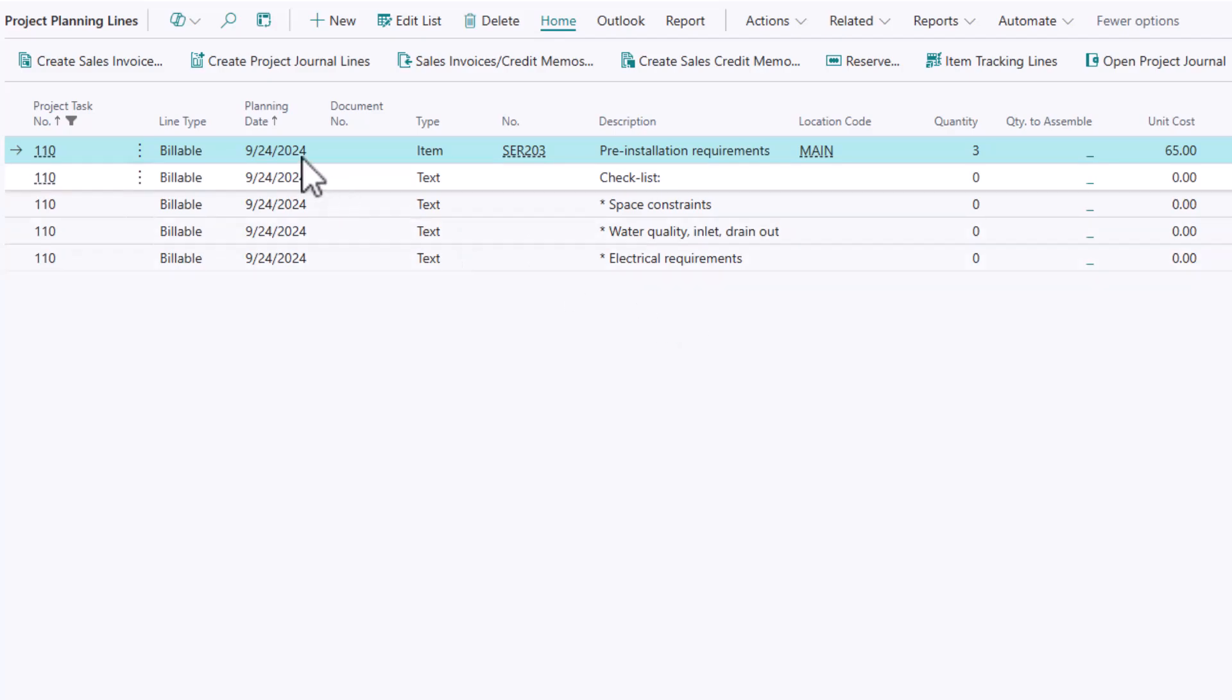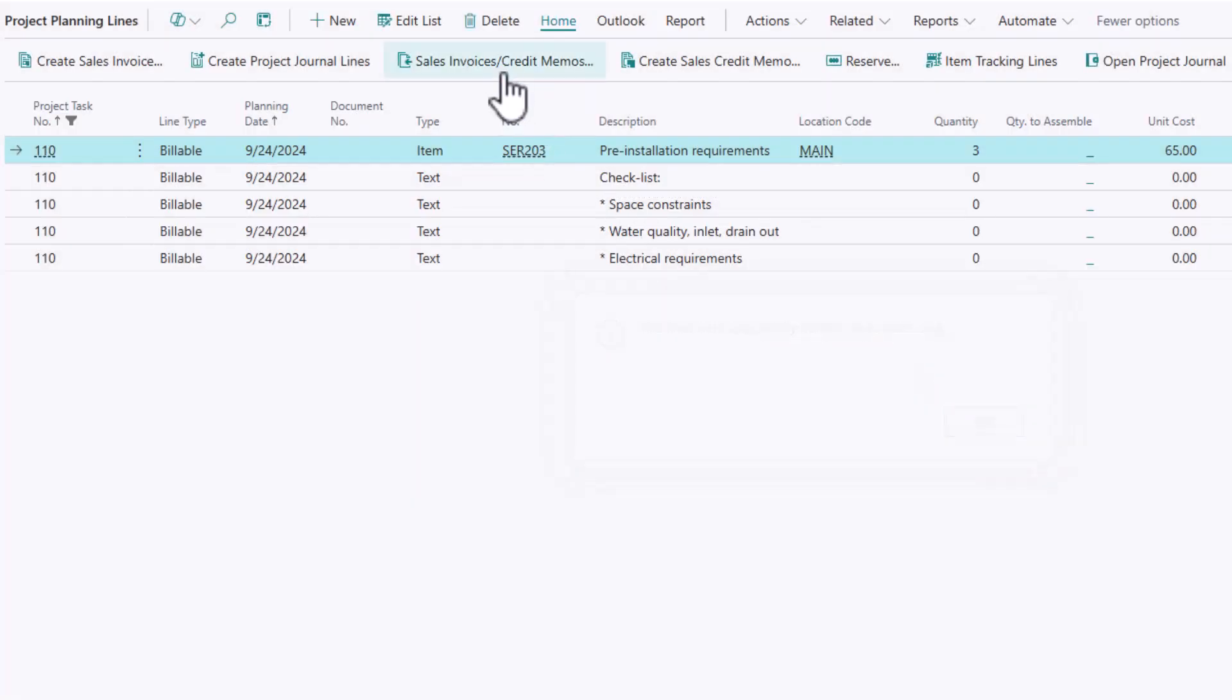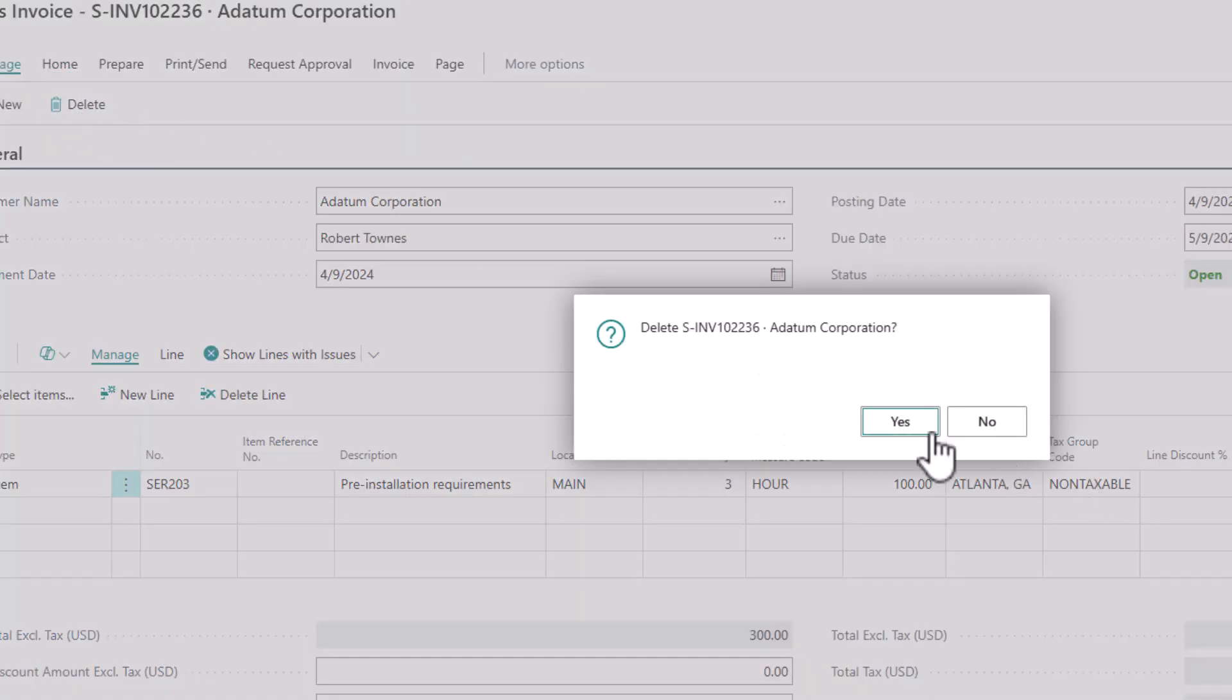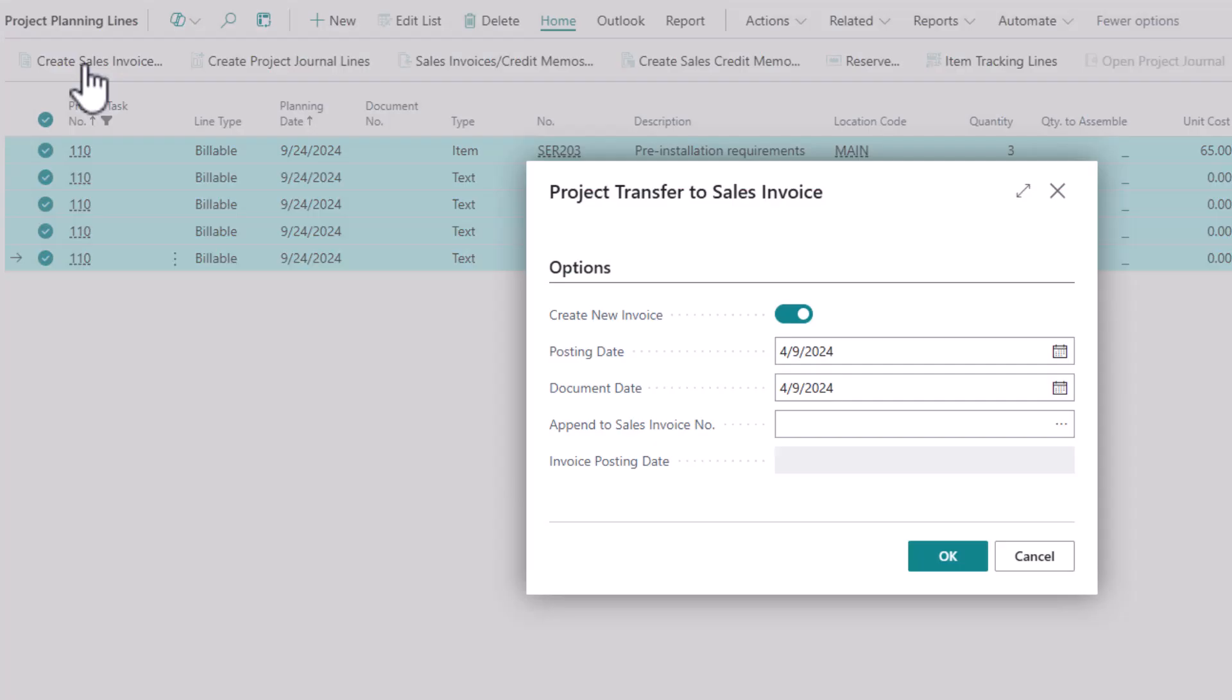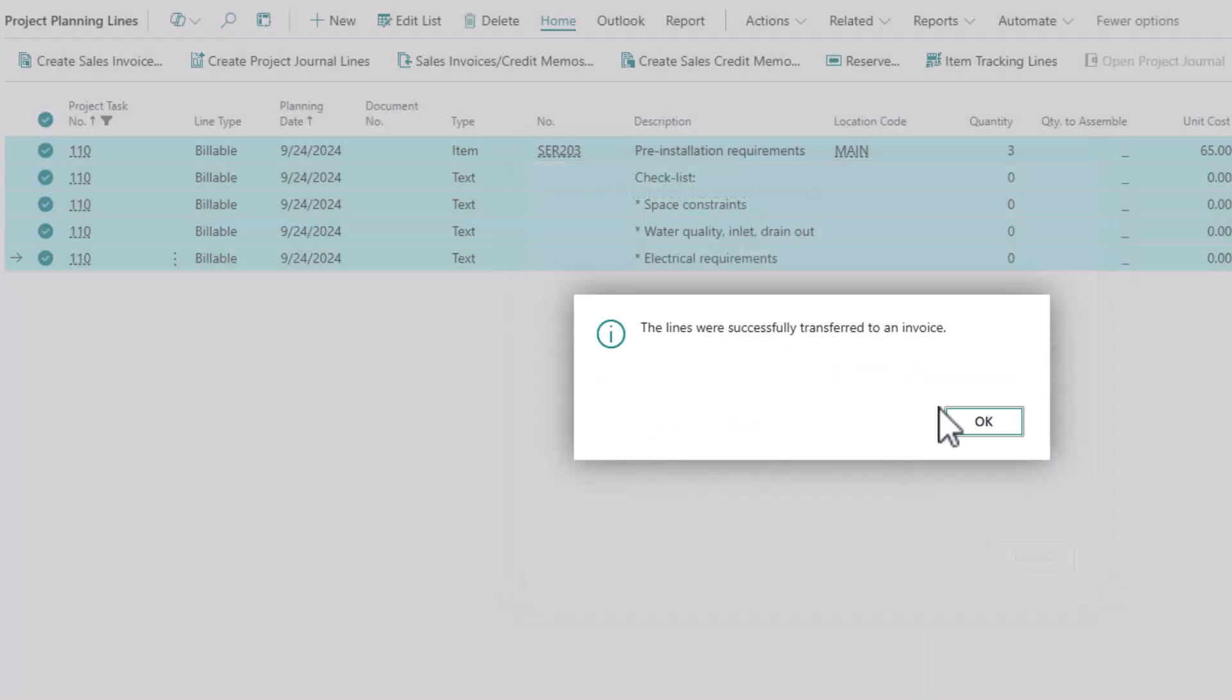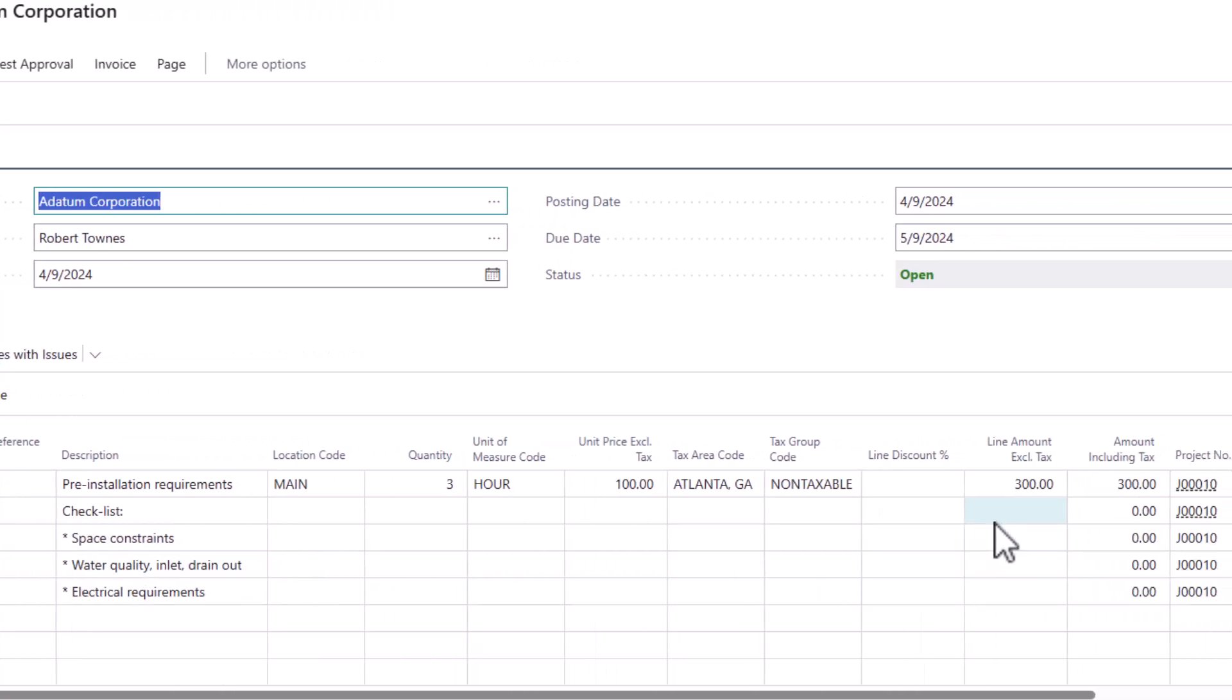Now you do need to be careful here. So if I run the process, it is only running it for the one line that I have highlighted. So if I hit okay, my sales invoice is going to come back with that single line on the invoice. So when you're running the process, you want to make sure you do a shift click or you use the little toggle to select more. Once you've highlighted all of your billable lines and you create the sales invoice, then it transfers all of those lines to the sales invoice. So now you'll see both the billable event plus the comment lines that went along with it. Now they don't have any pricing to go with them. They're just comments. But that's a way of building that structure.